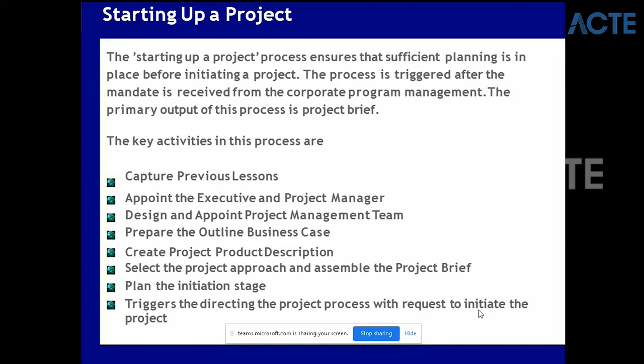One question: before we are completely sure about the project, how can we appoint an executive and project manager? Appointment doesn't mean that they have to work - appointment is just to prepare, just to be ready. If the project gets approval, then this project manager will take over. If you don't appoint, you'll have trouble finding a project manager after approval. Appointment is just to identify the person - the project manager may work only after you get a green signal.